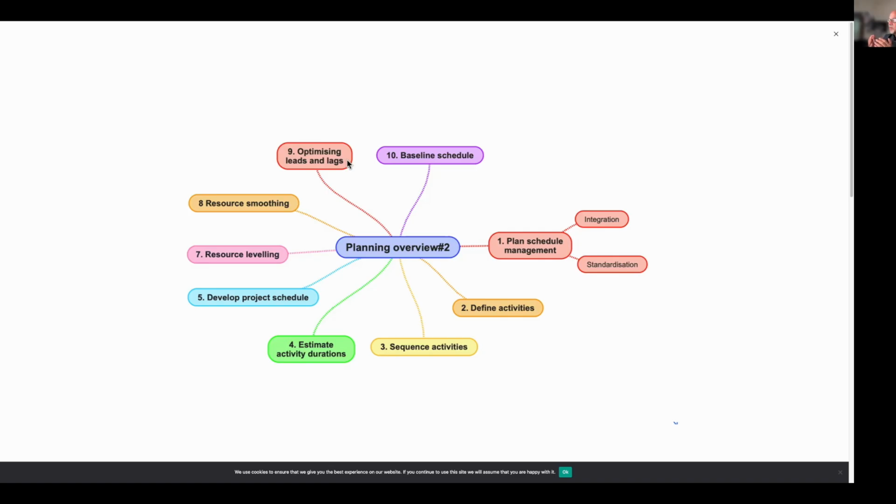Sometimes, the most important type of review is the constructability review. That means we might have done a beautiful schedule, but if it is not technically feasible, if it is not practical, there is no point in doing it. For that purpose, we do constructability reviews. And once we have enough confidence in the schedule and all the concerned stakeholders agree to it, then we baseline the schedule.